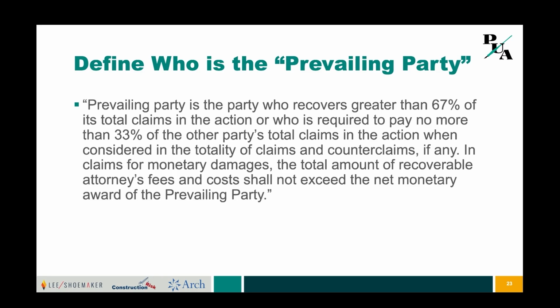So we don't like prevailing party clauses at all, but if you have to have them, at a minimum, put in an objective definition. It doesn't have to be exactly like this one, but it needs to objectively define who is a prevailing party. As a negotiating strategy for trying to get prevailing party attorney's fees provisions out of your contract because of the insurability issue, I will often try to use some common sense, and that is practical experience tells me that when you have a prevailing party attorney's fees provision, that can be a barrier or an impediment to settlement or resolution.